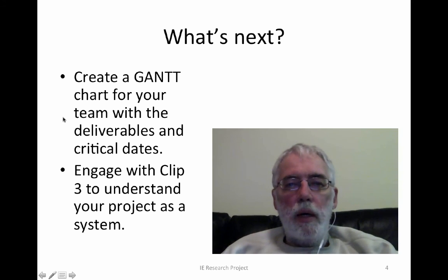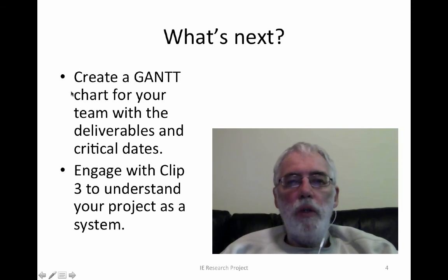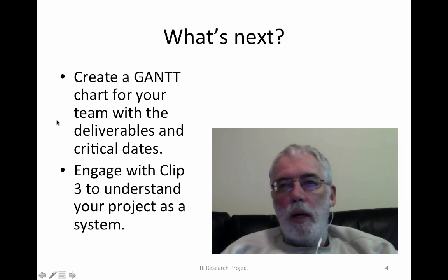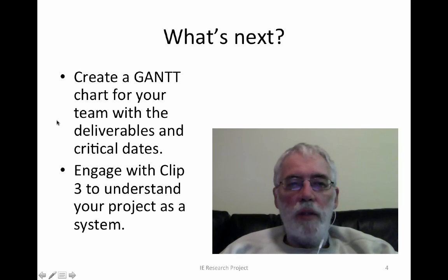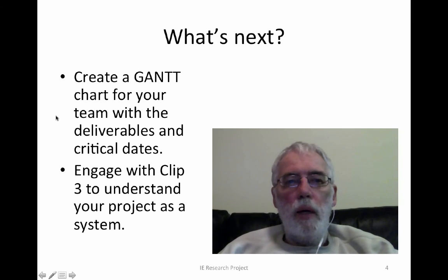During the duration of your project, I would be encouraging you to revisit that at least half a dozen times and adjusting the chart to take account of any changes that have happened in the rate at which you're doing work and